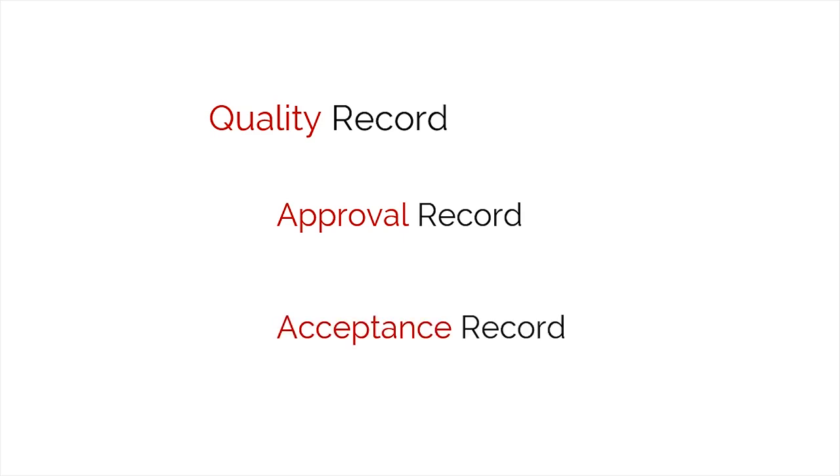An acceptance record is created when the project is being closed using the closing a project process. It's important to verify and record that the final product has been accepted. PRINCE2 uses the term acceptance to describe the ultimate approval of the project's product. This approval or acceptance is based on the product meeting the acceptance criteria derived from the customer quality expectations gathered in the starting up a project process.